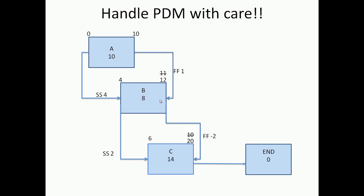Now, using the finish-finish relationship, remember we were at 12 here, now we come with the finish-finish of minus 2. So it goes to 10, and based on this we should be able to take the next step which is to look at how does this then go on to the end. We have a basic finish-start relationship at the end and we see that this has gone on to 20, because we are taking the 20 from the early finish of C. As this goes to 20 and end is a dummy activity, we end with 20 and this took care of the forward pass.